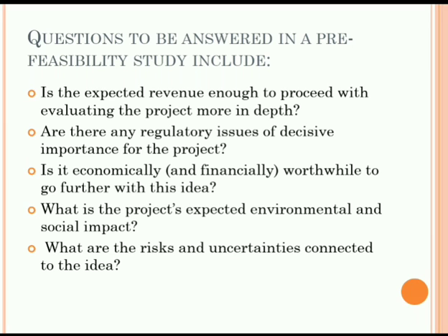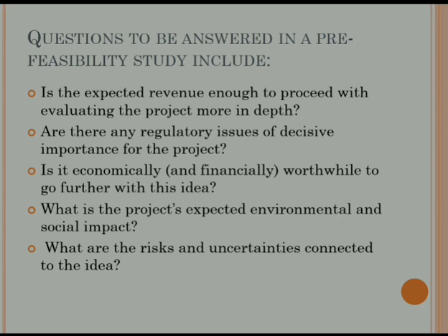Now let us see what are the questions that will be answered in the pre-feasibility study. As we have seen different questions in the initial stage, here it is the second phase, the next phase after initiation of a project. In this we will find out: is the expected revenue enough to proceed with evaluating the project more in depth? Are there any regulatory issues of decisive importance for the project? Is it economically and financially worthwhile to go further with this idea? What is the project's expected environmental and social impact? What are the risks and uncertainties connected to the idea?